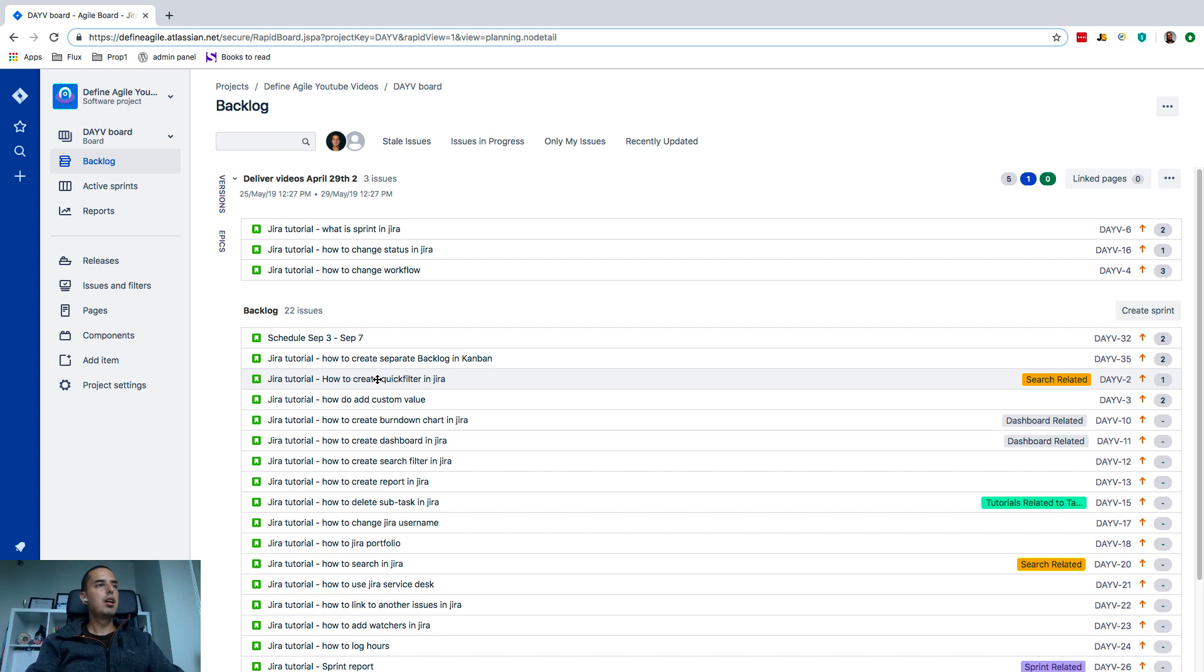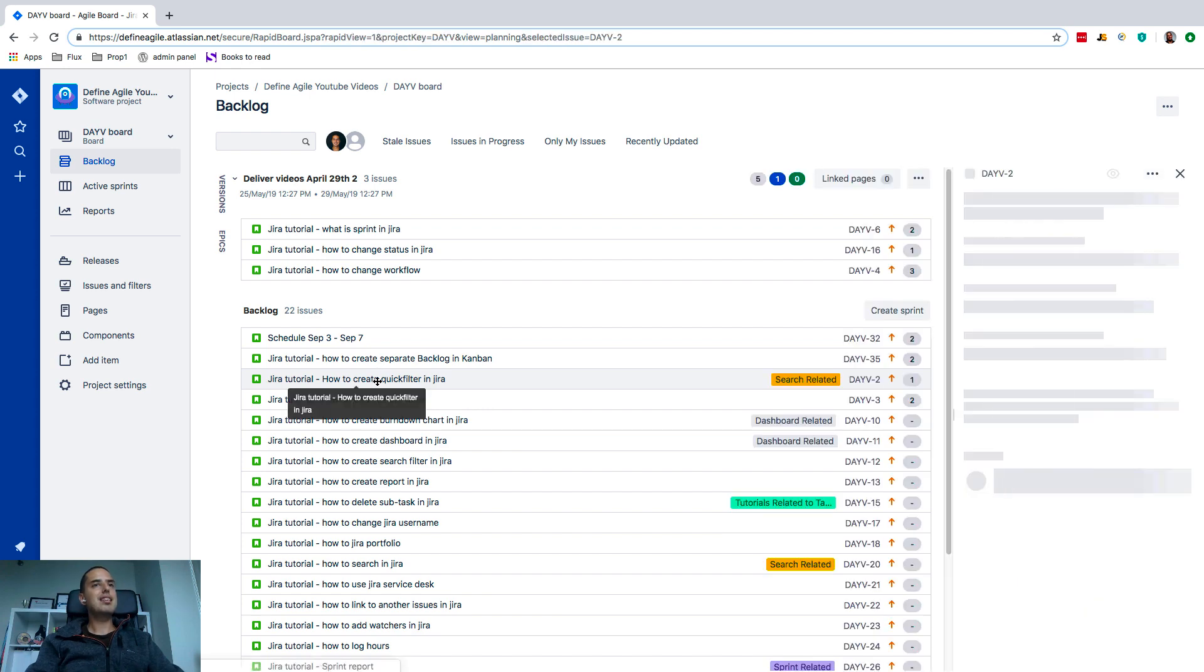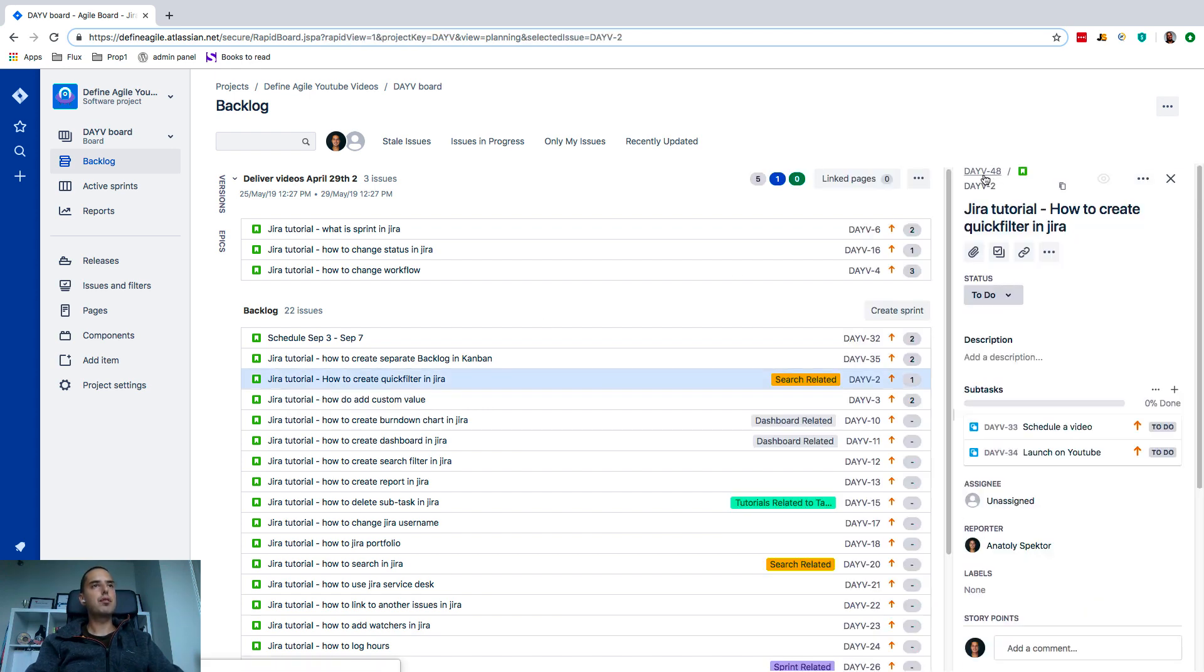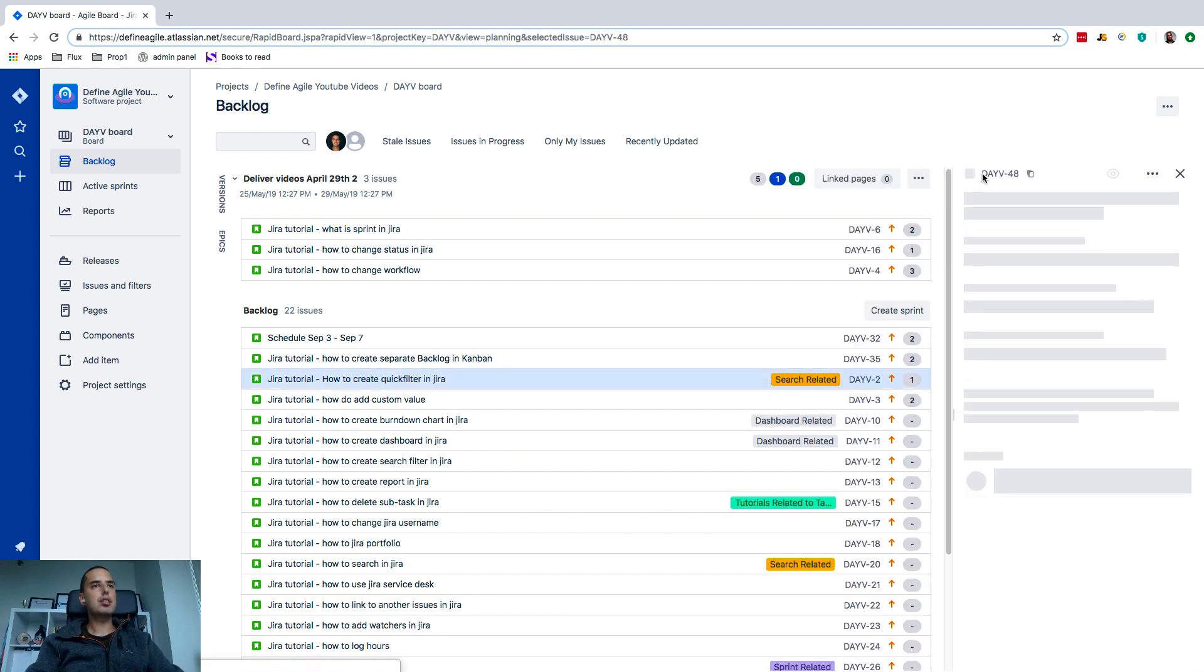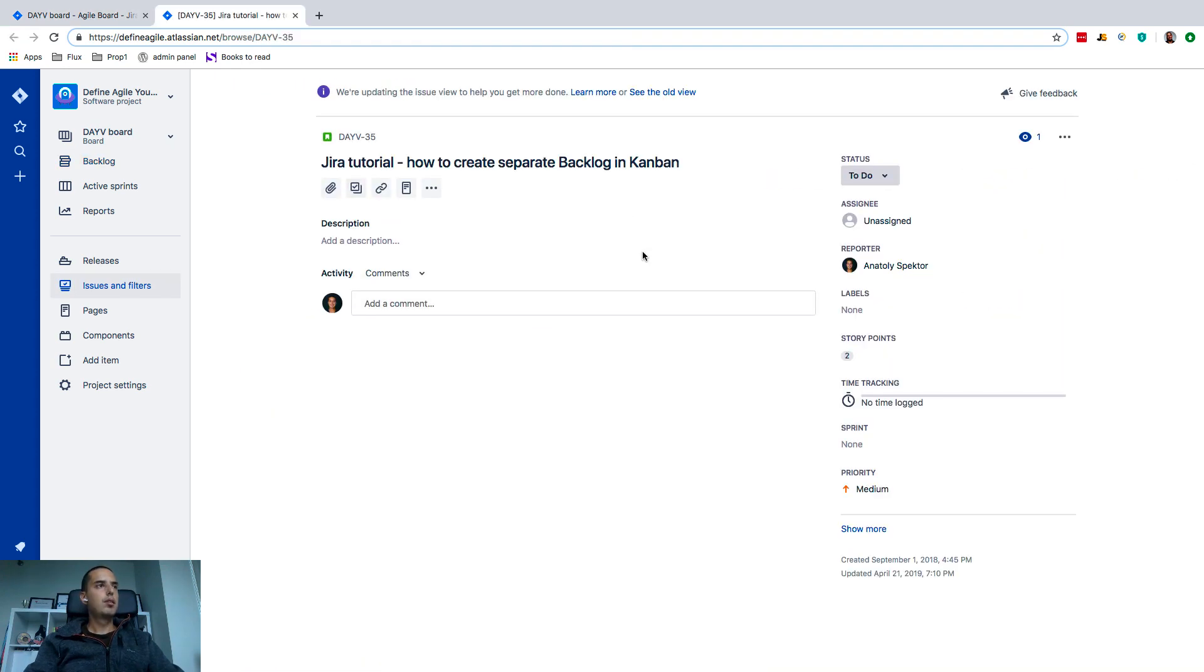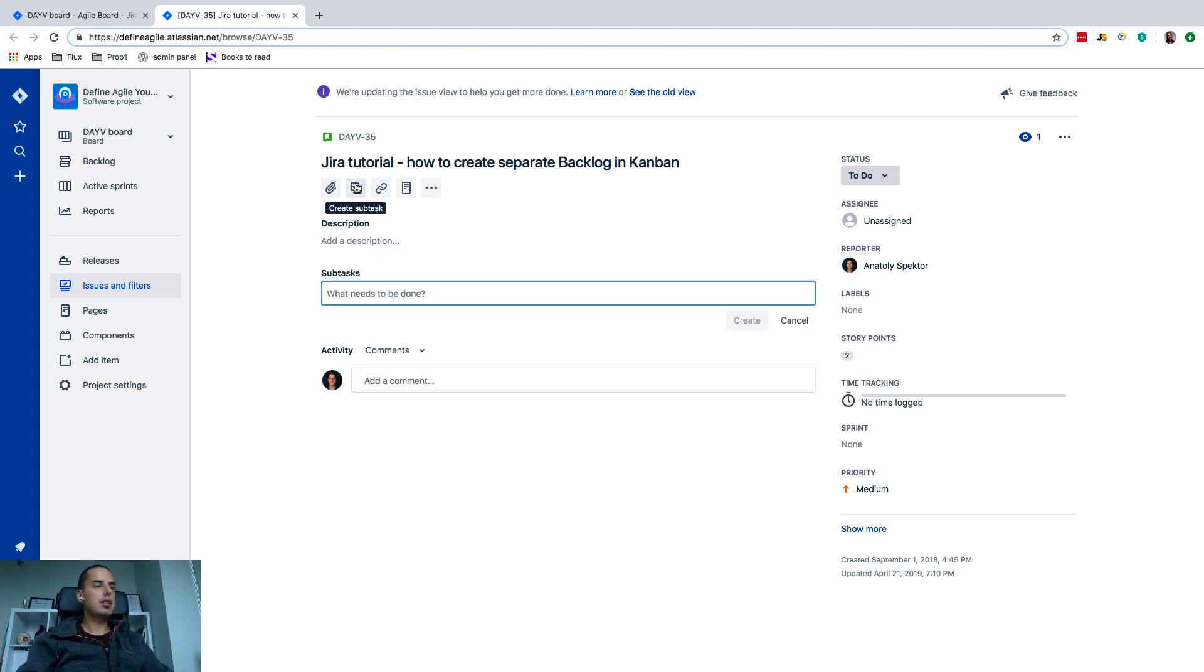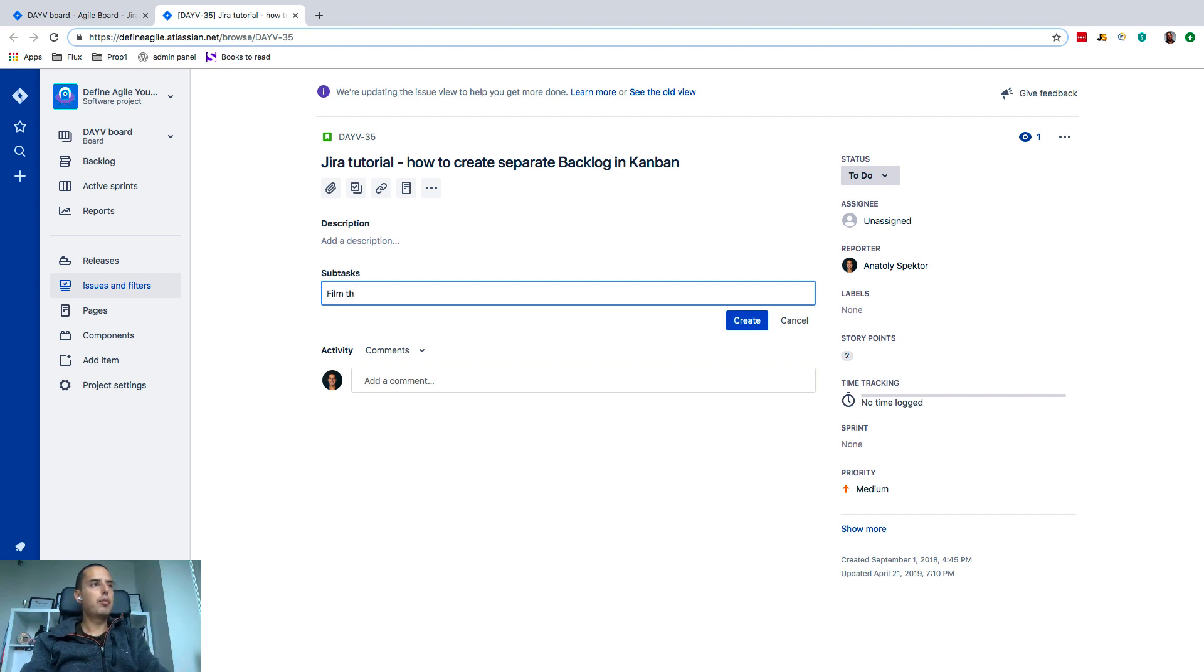A story, you can create a subtask of a story. So if you go to a task—so now we are in the story, inside of it—we can click on 'create subtask' and then I can say 'film the tutorial.'